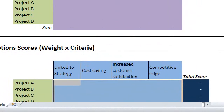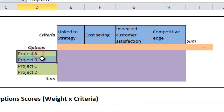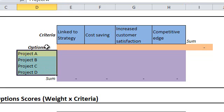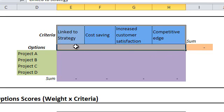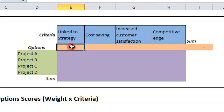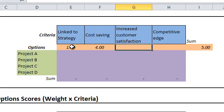We'll start with the first matrix. After listing all options from which we need to select the best one—in this case, they are project A, B, C, and D—the team working on the prioritization matrix should agree on the criteria items along with their weights. The simplest method to set criteria weights is to start with the least important criterion and assign a one to it, then assign weights to other items as multiples of it.